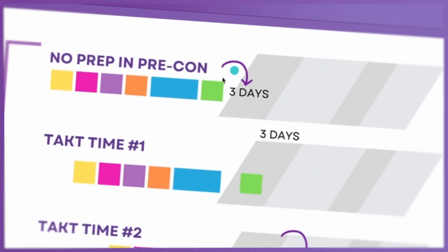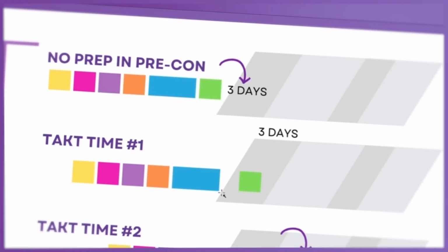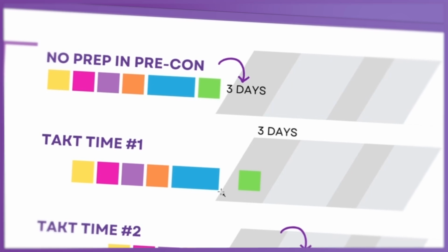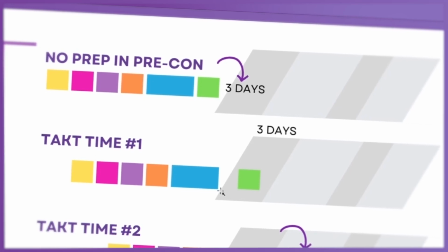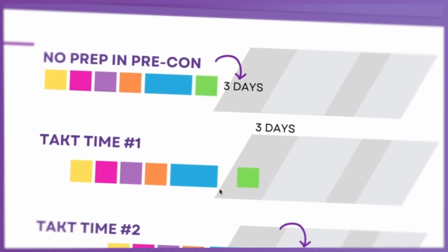So before you start, you'll end up with everything prepared. Then you start and your first wagon or task, by the way, task is an individual activity. A wagon could be individual, but it's mainly the packaging of work within a zone in a certain takt time. And sometimes you have more than one work package or task in there. So a task or a wagon.